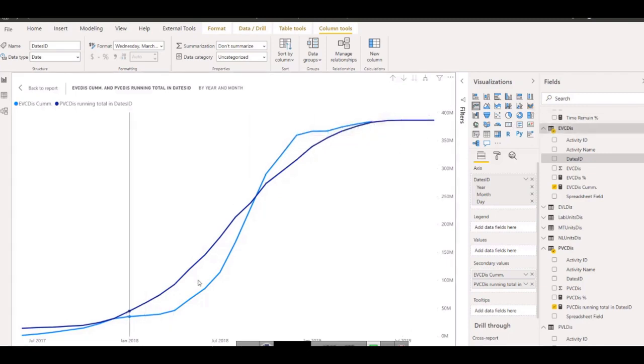You will go in the future to do the work. So if my project is 24 months, I am standing at this point, I don't want this horizontal long line passing through my visuals to make a very irritating visual. So I want them to be removed. So this is the point where my data date is present inside P6, because after that there is no actual progress available. After that there is no earned value. So I want it to be stopped here. So this is the case.